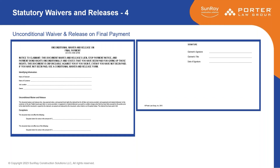The last one is the 'Unconditional Waiver and Release on Final Payment,' which means the check has cleared the bank. You fill this out as before. You can have an exception for disputed claims for extras in the amount of blank, and then you sign it. This is basically saying: I got everything, the check has cleared, it's unconditional and it's final. The only remaining issue is what you listed as the disputed exception, and then you set about trying to resolve it.